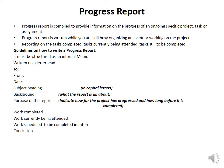Guidelines on how to write a progress report: it must be structured as an internal memo, written on a letterhead. You need to write 'To' and 'From' — it can be to the particular managers or department, from your name or your department. The date must be written in full. Write your subject heading in capital letters. The background covers what the report is all about — for renovations, you would state that you are giving a progress report on the specific ongoing project within your organization. The purpose of the report indicates how far the project has progressed and how long before it is completed.